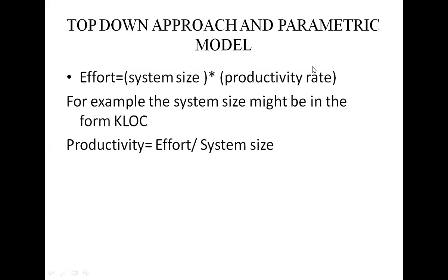In software, it relates to the characteristics of the final system. So see here, the parametric model gives the formula: effort equals system size times productivity rate. System size is represented in the form of KLOC. KLOC means thousands of lines of code. K means thousand.